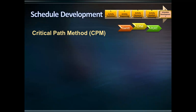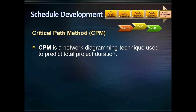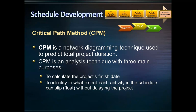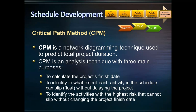A method that predicts a project's total duration is the Critical Path Method, or CPM. CPM is an analysis technique with three main purposes: to calculate the project's finish date; to identify to what extent each activity in the schedule can slip without delaying the project; and to identify the activities with the highest risk that cannot slip without changing the project finish date.